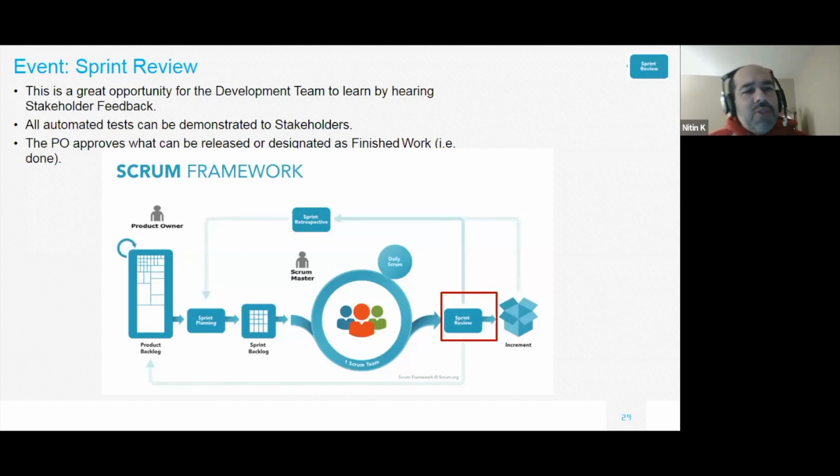And oftentimes you're going to get feedback from stakeholders. Yeah, I asked for that, but could I also get, or I didn't envision it to be exactly like that, maybe the UI, maybe the buttons and so on. We welcome feedback, and this is the beauty of Scrum. We're going to get that and put it back into the backlog and determine what value it has. Is it something that can just be addressed in the next sprint, or is it something that wasn't entirely complete that we should just carry forward?